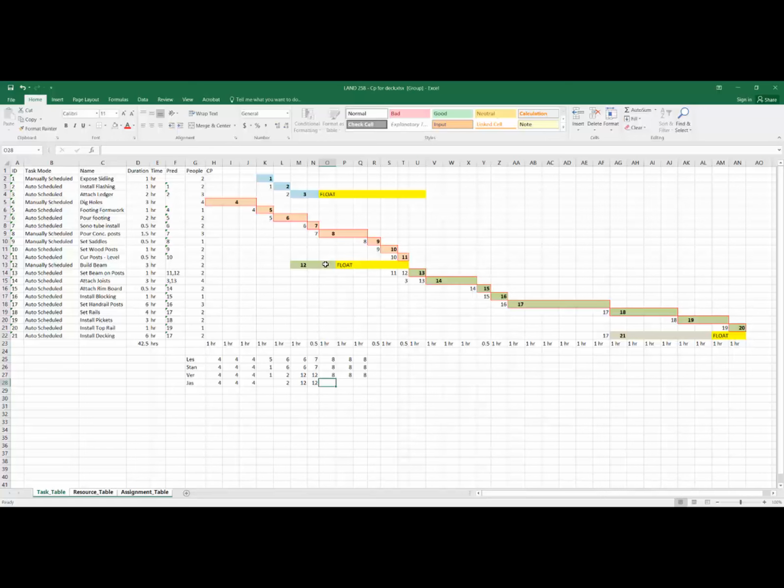This requires 3 people, so I can't use this anywhere along this timeline. So Control X. I'm going to move right to this one, Control V to paste that in. I don't have a float there anymore, so I'll paint it as white. So I need one more hour of event number 12. This requires 3 people. Okay, I got to leave it.